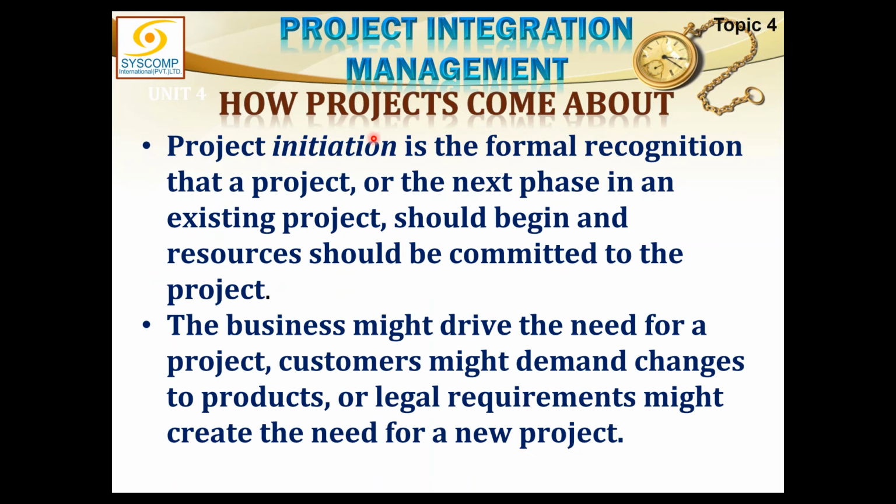Now, how do the projects come into being? Initiating a project is the formal recognition that a project or the next phase of an existing project exists. This is a formal documented way of recognizing a project or a phase. Because I said a phase is also to be treated as a project, a phase will also be initiated, and there will also be a charter for each phase.